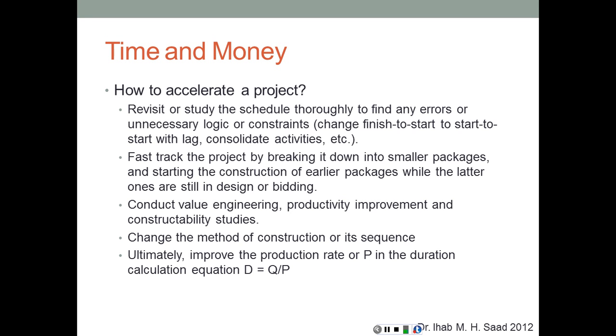Like, for example, we can change a finish to start activity sequence into a start to start with lag, or we may increase the amount of overlap between the activities, or we may condense or consolidate activities into one activity rather than more. Another option would be to fast track the project by breaking it down into smaller packages and